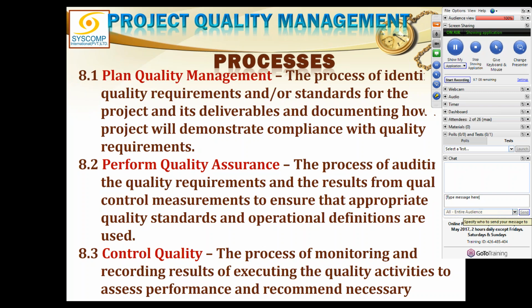Now I'll come over to the other thing which I just mentioned, quality control measurement. We do understand that while I'm doing the quality assurance here, somebody is doing the quality control when the deliverable gets out of the process. When my process completes, some deliverable will be sent out and that will be checked by quality control. Quality control is a very good measure to indicate if there is something wrong going on. You see, the product which is being produced is consistently faulty and is being rejected by quality control. Then quality control, why can't it communicate with the quality assurance people and tell them, well, we are having this kind of problem in the product. Please go to that process and check where this problem is occurring and fix that.